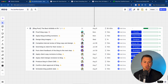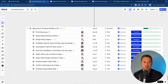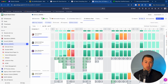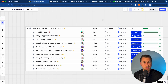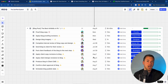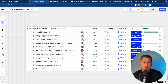All of these individual tasks are then assigned to individual people, so now each person knows what they need to do. In addition, they're also going to have due dates on each of these tasks so that you know when they need to do it as well — for example, proofing the blog copy is due on Monday. They're also going to have a time estimate on there, which is going to then populate this workload view. Because I have a due date, a time estimate, and an assignee on all of my tasks, that gives us good visibility into workload and capacity, as well as helps us plan out into the future. I'm going to know that I need to apply client design revisions to the blog on August 3rd, so I'm going to have good visibility into the future of what I need to do — so that I can plan my work ahead and stay consistent with our timelines to make sure we're delivering on time for our clients.